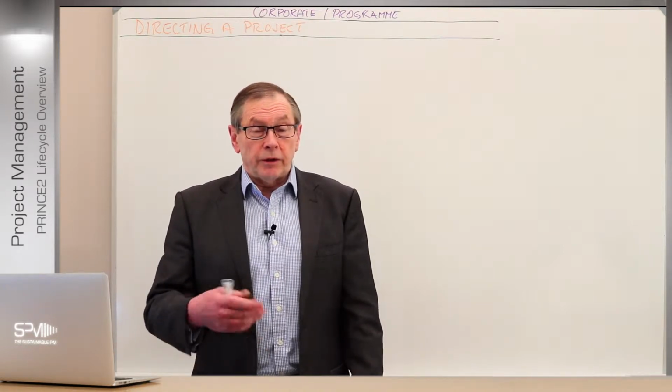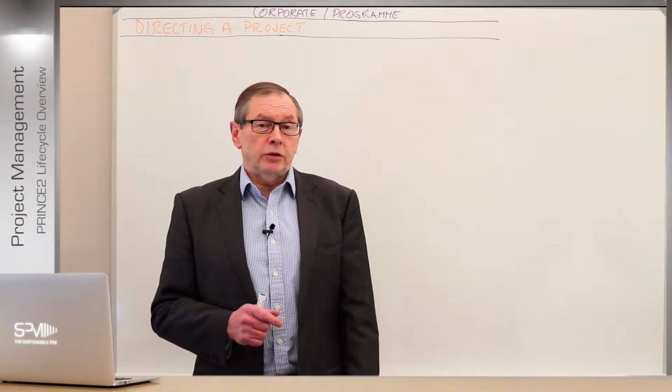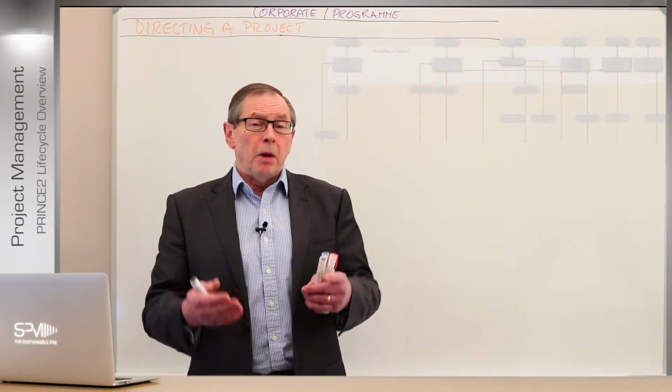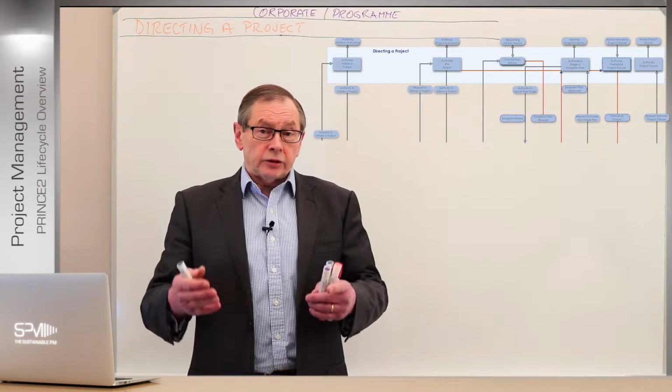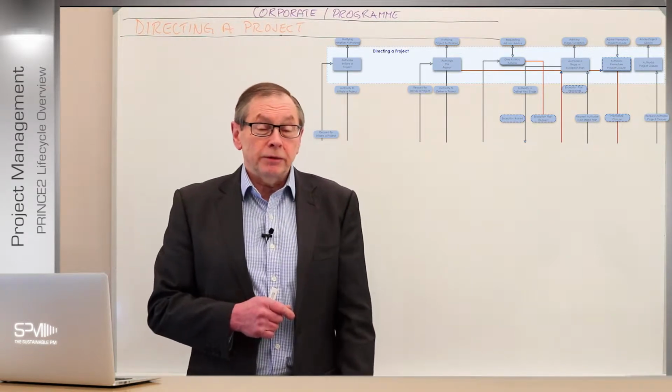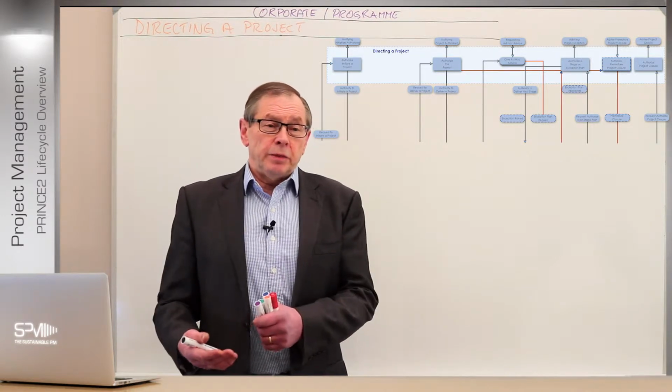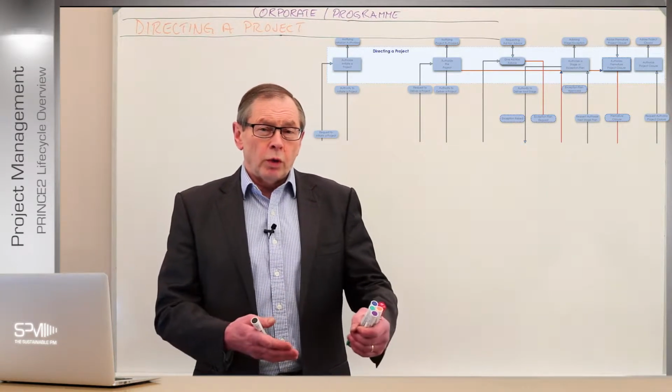And what we're really doing is the very first part of the delivery aspect of the project. And we do that in the stage boundary. The stage boundary marks the end of a stage. That's what they call a boundary, strange enough. And at that point, we update everything, and then we plan to go on to the next bit. That's what we're doing really, that boundary. We've marked all the work done during that stage.